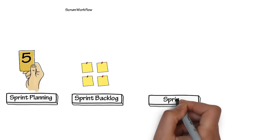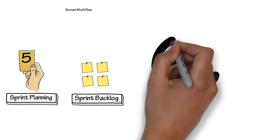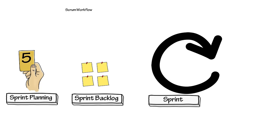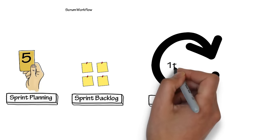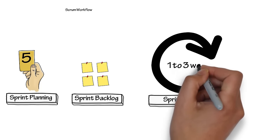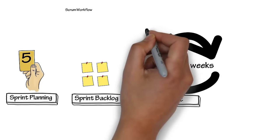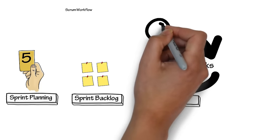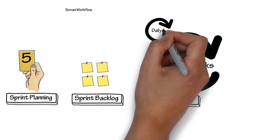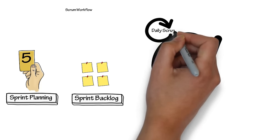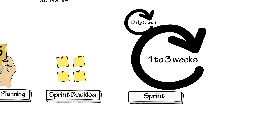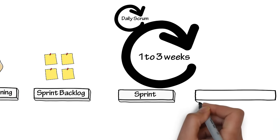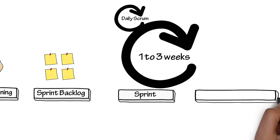The sprint is a one to three week time box, where the work committed to in the sprint backlog is worked on through to completion. During the sprint, the daily scrum occurs as a stand-up meeting, where the team discusses what they have completed and what they are working on, as well as any blocked items. The outcome of the sprint is a potentially shippable product.